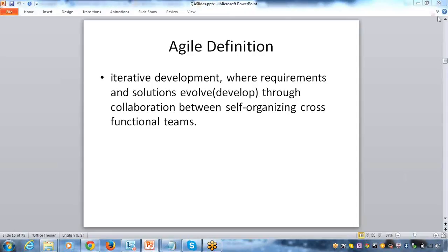So when you say agile model, here we are developing the application based on iterations. Developing the complete application may take a lot of time, so let's split the application into iterations. First iteration, let's focus on login. Once we are done with the login, let's focus on the search. Once we are done with the search, let's focus on the other module. If you are working with this kind of incremental or iterative model, then you can develop your application within very less time.